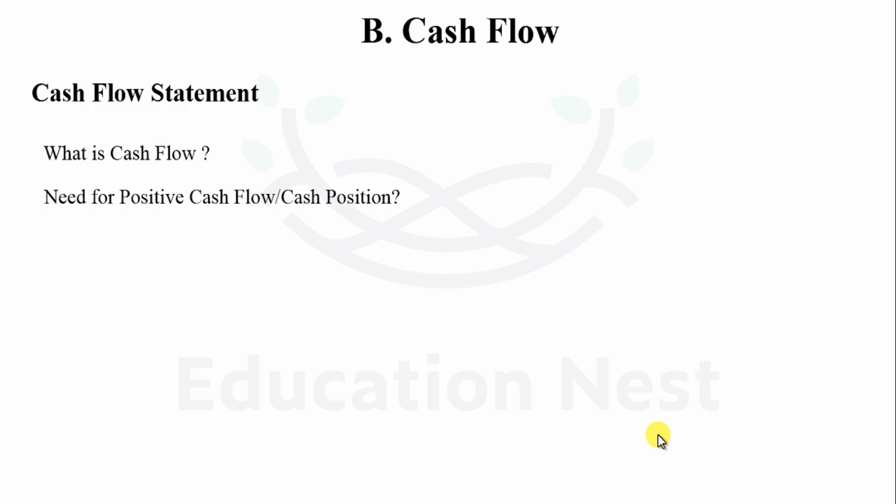Supposing one of the projects falls short of cash and is in dire need of it, to encash a good opportunity or pay off an unexpected expenditure, and the project manager is aware of the cash positions at any point of time and has surplus positive cash flow in the other projects, he can divert resources from project A to project B, which is demanding cash for the time being, and then when project B generates positive cash flow, repay it back to project A.